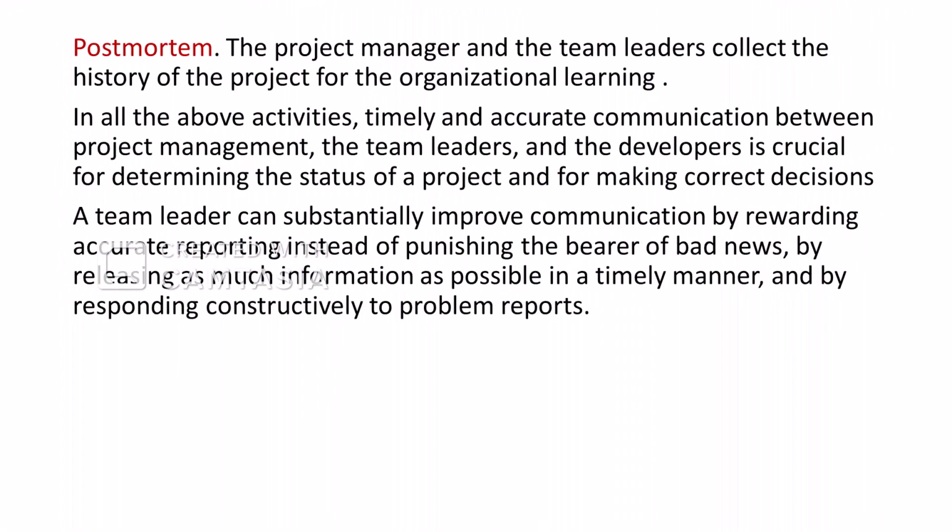Next to that, we have post-mortem. The project manager and the team leaders collect the history of the project for organizational learning. In all the activities, timely and accurate communication between project management, the team leaders, and the developers is crucial for determining the status of a project and for making correct decisions.